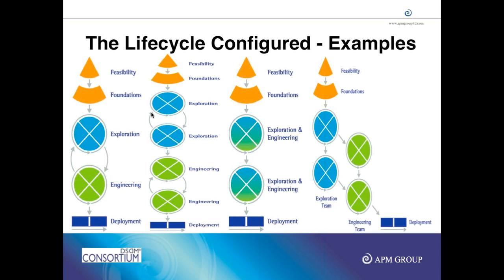In short, if I have to explain, somebody asks me an estimate, how long will you take to deliver this system? And I say 2 weeks for analysis, 2 weeks for design, 4 weeks for development, and 2 weeks for testing. So 2 weeks for analysis plus 2 weeks for design makes 4 weeks. 4 weeks for development makes it 8 weeks, and 2 weeks for testing makes it 10 weeks. So if I start, it will take me 10 weeks to show you something which is working.